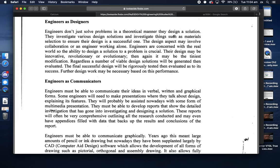Typically engineers as designers follow a design process: understanding the problem, researching, developing solutions, evaluating those solutions, coming up with a final design, managing that, and evaluating the success of those plans. Evaluation was a big part of my job. After any stage of our project - the red review, gold review, final review - we would do a lessons learned. In rail, a lot of work is done in stages called possessions where you shut down two or three tracks.